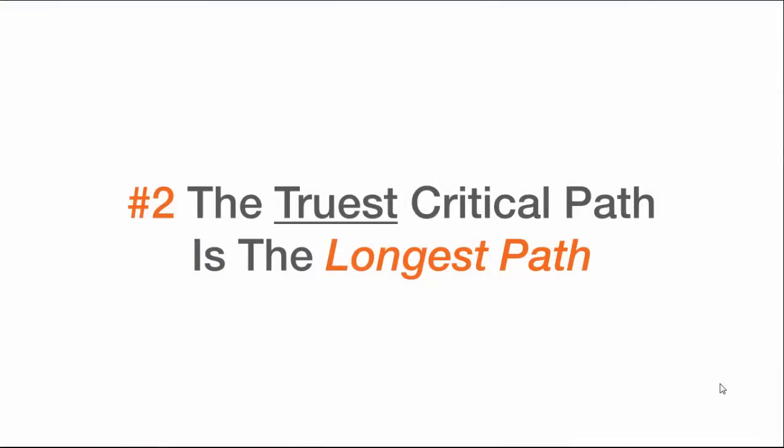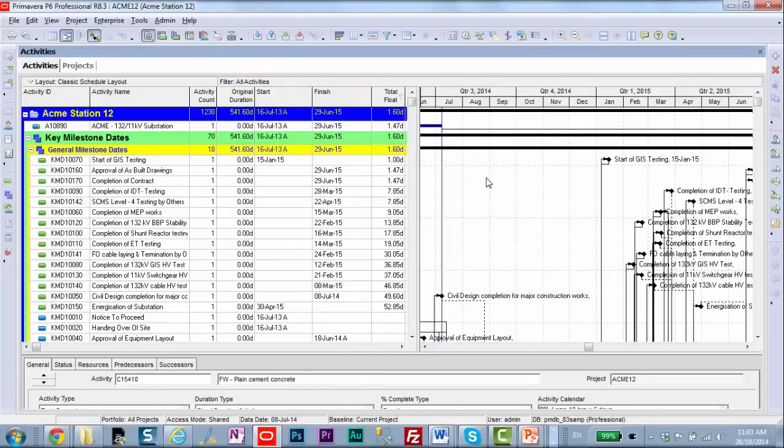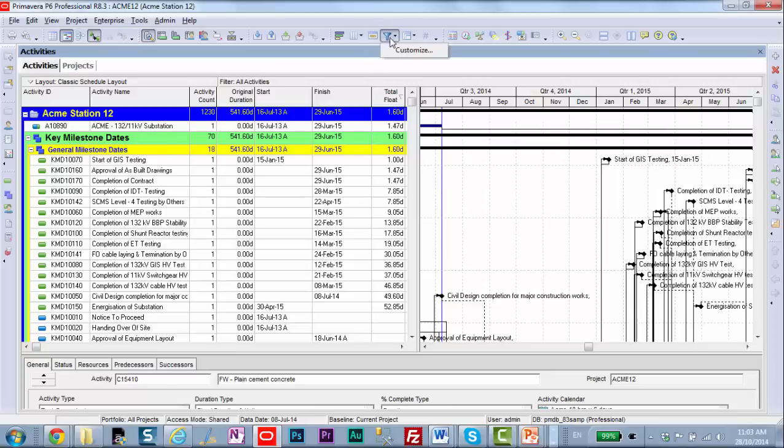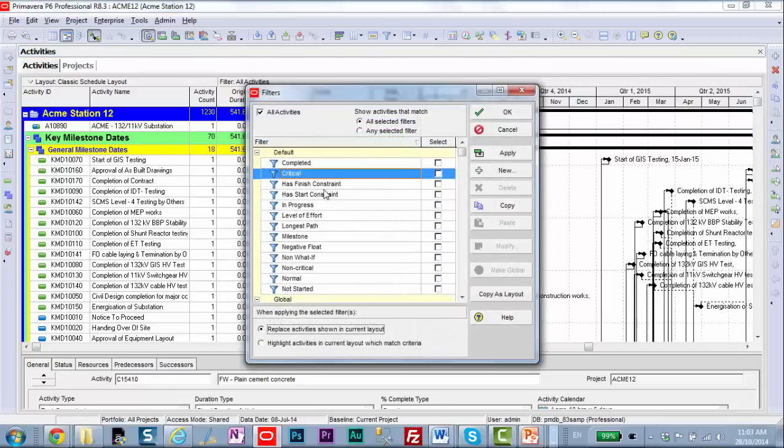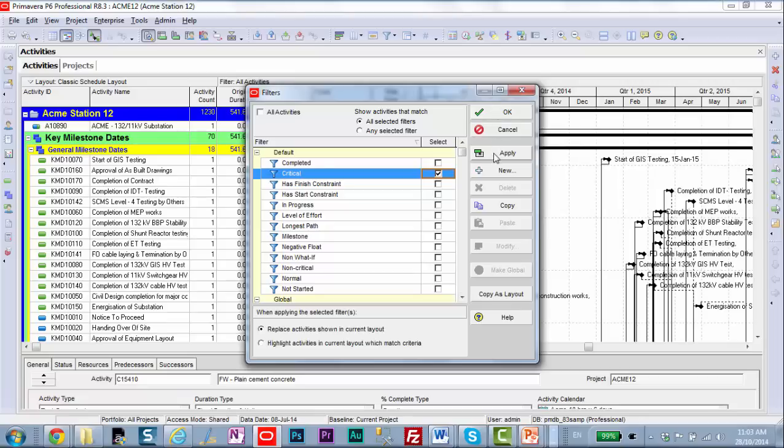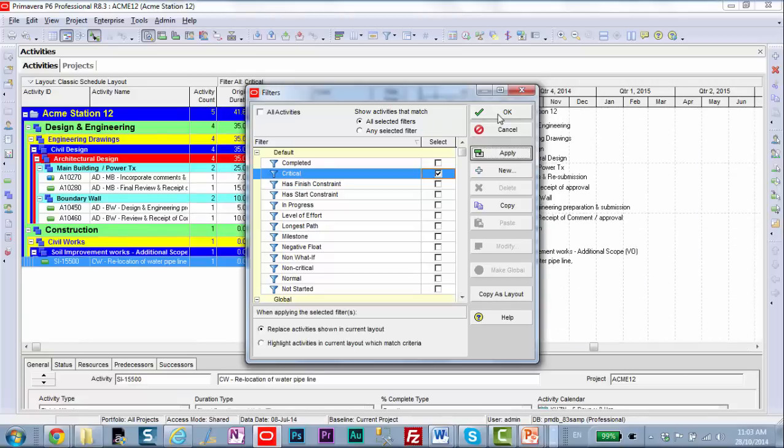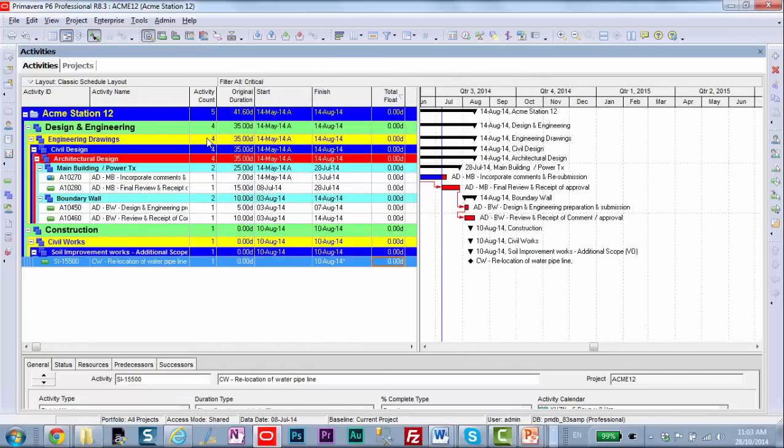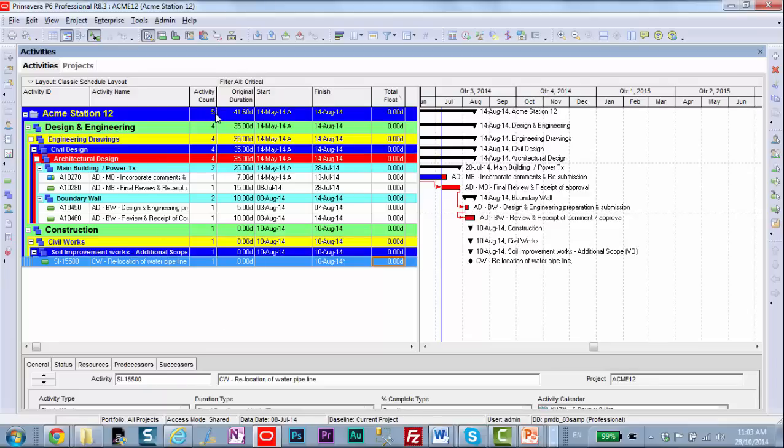The second item I wish I'd known earlier in my career as a P6 planner is that the truest critical path is the longest path. What do I mean? Let's go and look. Anybody who's used Primavera for a little bit knows that you can go into Filters and turn on the Critical Path filter. So when I do that, here's my project's critical path. Now this is a large project, and this seems like a very short critical path for the size of this project. And I have a look at my activity count. I only have five activities.